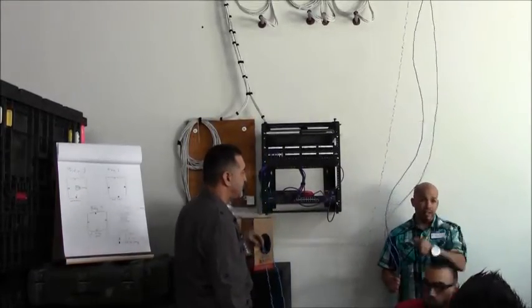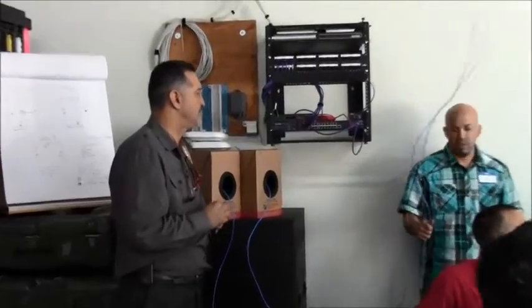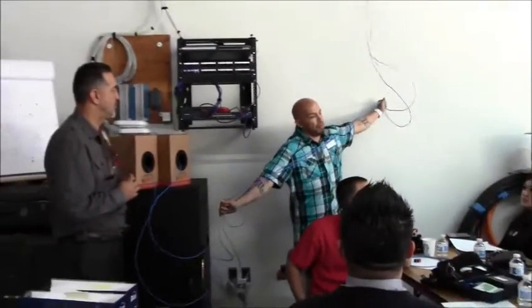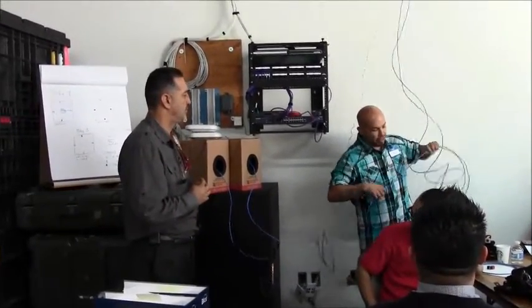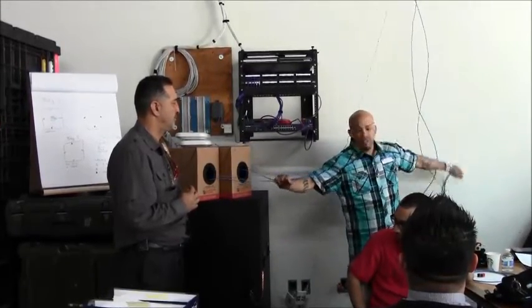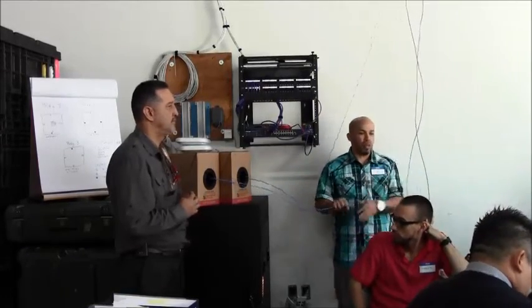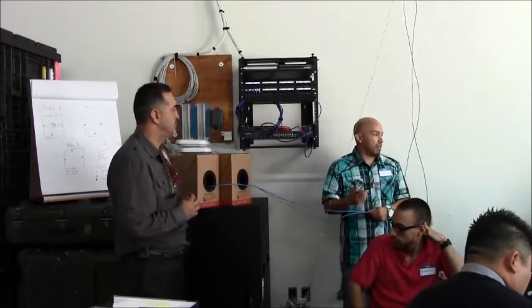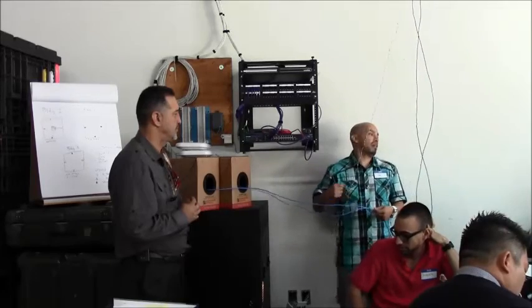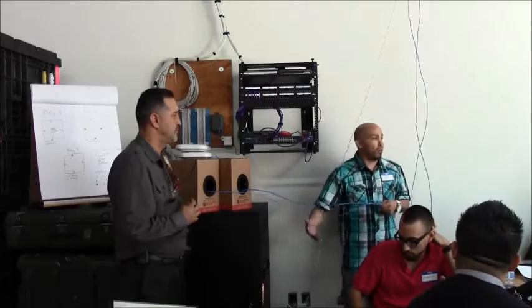So what I'll do on that end, usually the easiest way, say the customer wants about 20 feet on both ends. Your arm's length is probably about 5 feet, right? Just take it, 5, hold your hand there, then again, 10, 15, and then 20. It doesn't really have to be accurate, just as long as there's enough. I'd rather have more than less, because if it's less, I have to do more rework. I have to pull another cable, another line. If it's more, so what? I cut it off.